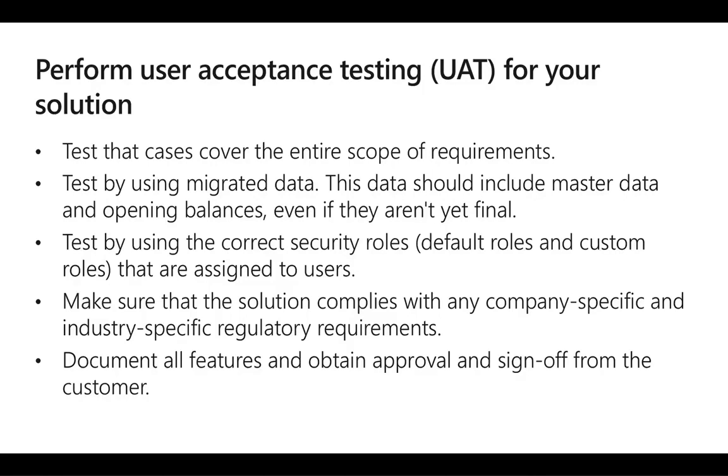Testers receive systems user training so that they are familiar with the user interface and the main functions of Dynamics 365 for Finance and Operations. They then follow a UAT script to step through all possible business scenarios related to a functional system area and record test results.